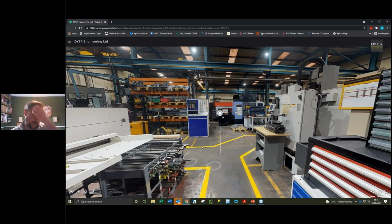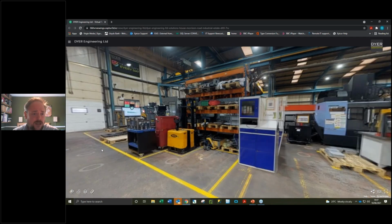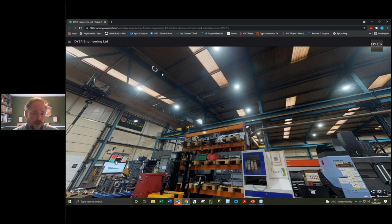So why is this significant? Well, during the planning stage of installing the equipment and the array of antennas, what that was going to look like was sending a set of engineers over, getting ladders, taking photographs, and identifying where all the receptive equipment necessary for the asset tracking needed to go. However, as we had this digital asset of our factory layout across our different facilities, it was possible to scan up and look at the infrastructure and the I-beams on the ceiling. And the guys at Think Inside, sat in Italy, were able to plan the location for all this equipment, and then provide the installation